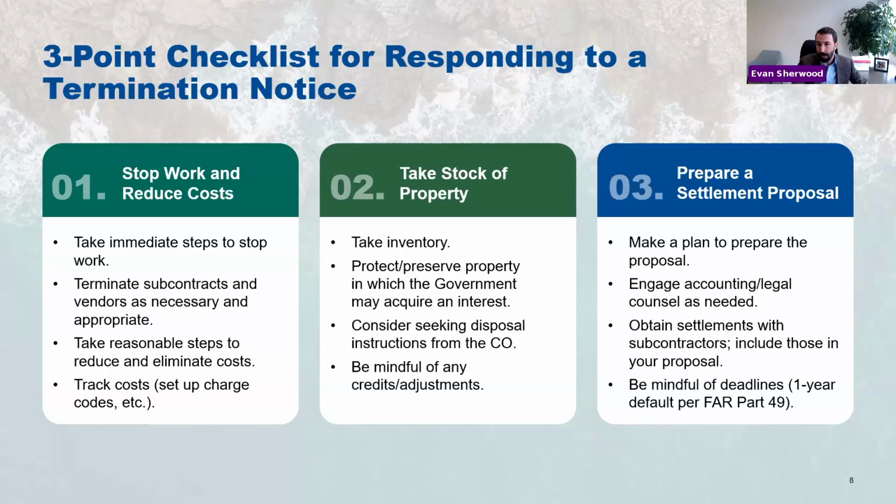We have a question in from the chat. The question is, is it typical for the government to assign a new termination CO once the notice is issued? The answer is, yeah, it's very common for a termination contracting officer to be assigned who administers the termination. Sometimes that person will have more experience with terminations and can administer it more smoothly because of that. Sometimes the PCO will hold on to a termination and do it themselves. It really depends. It's not a bad sign if you have a termination contracting officer assigned. Not necessarily a bad sign at all. So thank you for that question.